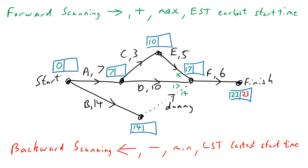Now backward scanning starts with the same number in the right-hand box — put it in red. Going backwards against the arrow, subtracting, and finding the minimum when there's a choice: 23−6 = 17; going up the top, 17−5 = 12; then 12−3 = 9; 17−10 = 7. Two options — choose the minimum, which is 7; 7−7 = 0. Going back through the bottom path: 17−0 = 17; 17−14 = 3. Choice of 0 or 3 — choose 0. The numbers at start and finish must match, and at the start they're both 0, so if you've done something wrong you'll find it right there.